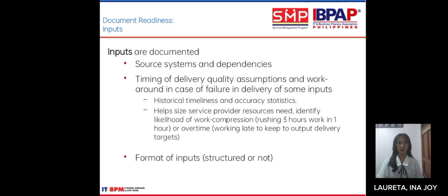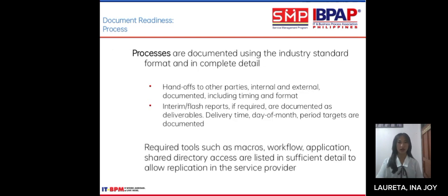Processes are documented using the industry standard format and in complete detail, including handoffs to other parties, internal and external, documented including timing and format. Interim or flash reports, if required, are documented as deliverables, with delivery time, day of month, and period targets documented. Required tools such as macros, workflow, applications, and shared directory access are listed in sufficient detail to allow replication in the service provider.